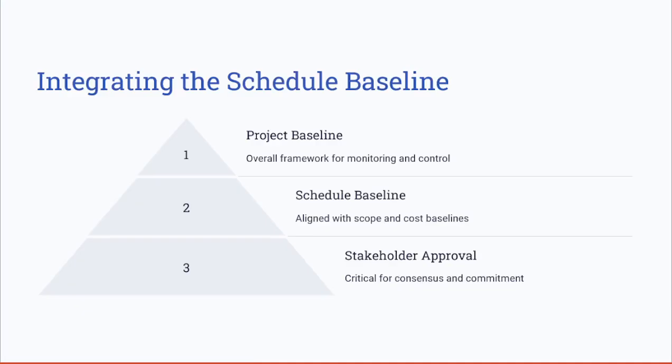Integrating the schedule baseline with the scope and cost baseline creates the overall project baseline. This integration ensures that the project dimensions are aligned and provides a comprehensive framework for monitoring and controlling the project. Also, stakeholder approval of the baseline is very critical to gain consensus and commitment.